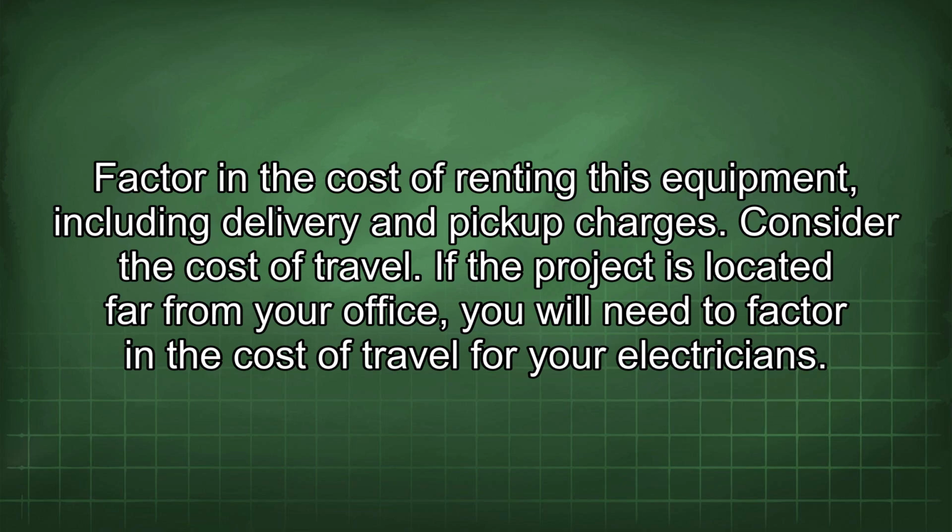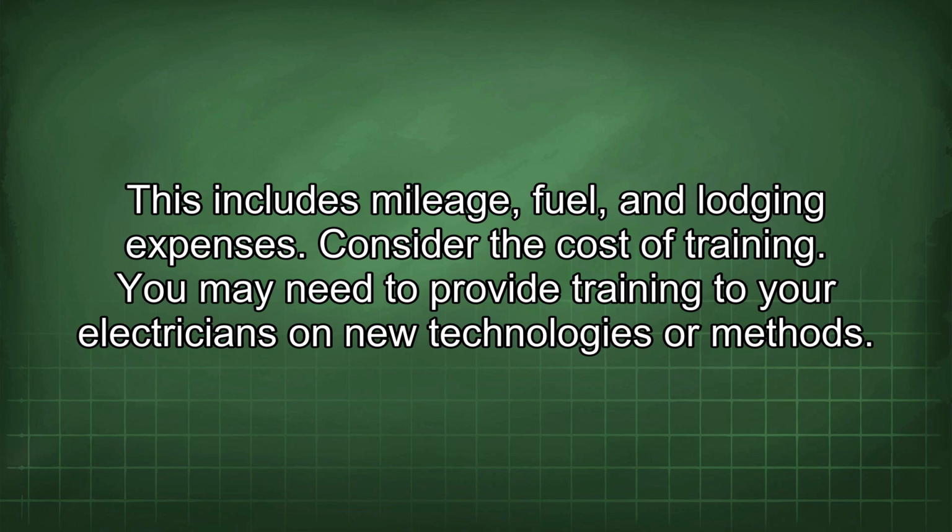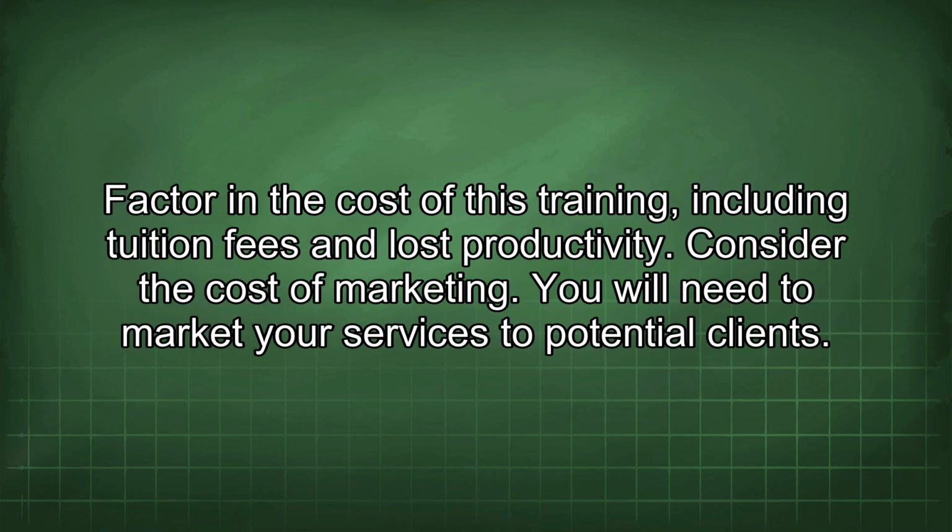If the project is located far from your office, you will need to factor in the cost of travel for your electricians. This includes mileage, fuel, and lodging expenses. Consider the costs of training. You may need to provide training to your electricians on new technologies or methods. Factor in the cost of this training, including tuition fees and lost productivity.